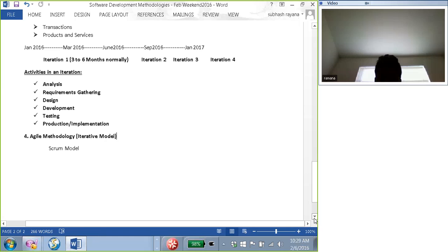If the project status is yellow, it means that we are definitely not on track, but based on certain things that need to be taken care of, we will be able to accomplish it based on where we stand today. Red means that there is something terribly wrong that needs to be addressed, and if that is not addressed right away, this project is not going to make it in the given time.